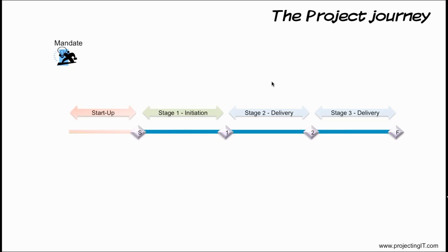For each management product, the PRINCE2 manual offers a template in Appendix A. Examples of such outputs are business case, benefits review plan, risk registers, issue registers, quality register, reports, and so on. These are all management products which are used to manage and control the delivery of the project.